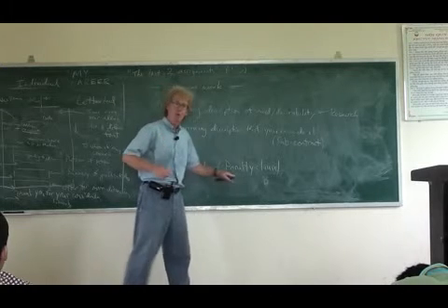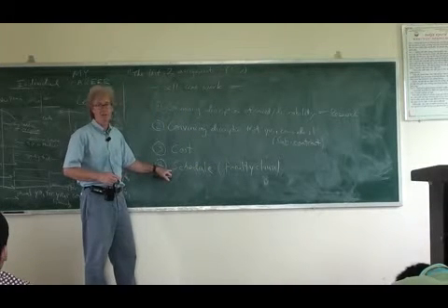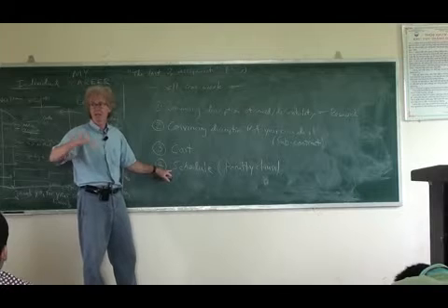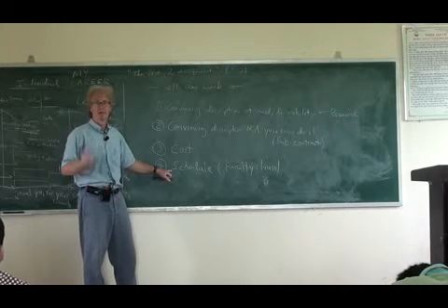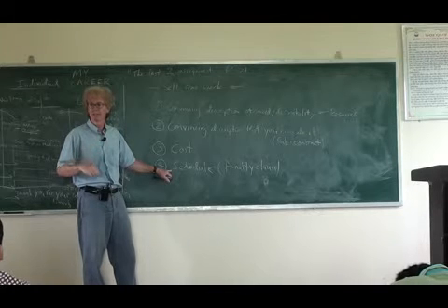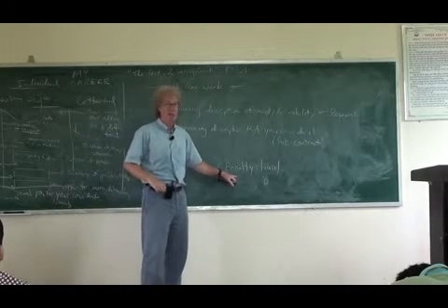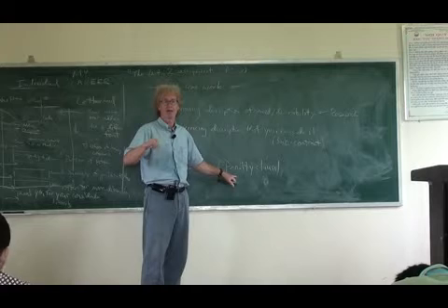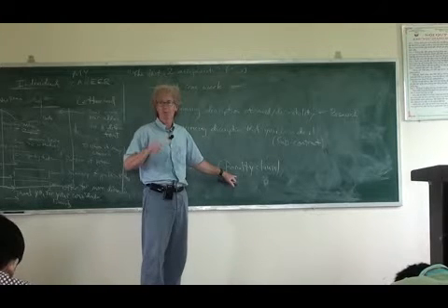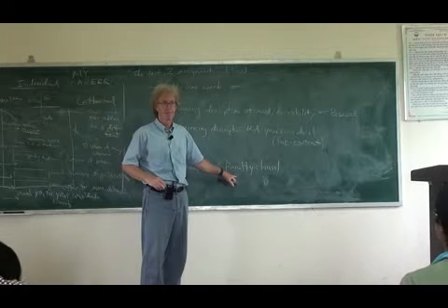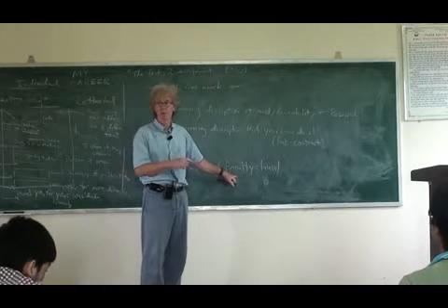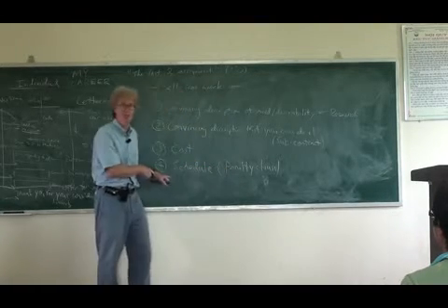And there's almost always a penalty clause for a delay in the schedule. So if I get a big contract to build the highway to Hanoi and I promise I'll be finished by, I don't know, June of 2013, then the penalty clause might say, beginning in July of 2013, you lose 10% for every month until the highway is finished. Okay? So that's a lot of money. So you want to make sure that your schedule is reasonable.